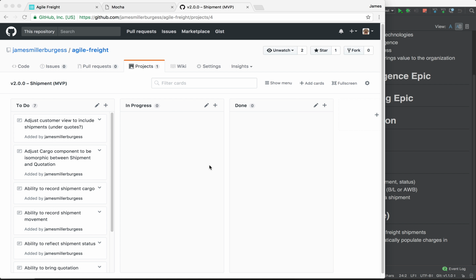You go through a meeting called sprint planning, which is attended by the product owner and the development team, and hopefully the Scrum Master, in which the development team will select cards from the product backlog according to the prioritization of the product owner, but they will only select so many that they are confident that they can complete them to the predetermined quality bar. And that quality bar is represented by something called the definition of done.